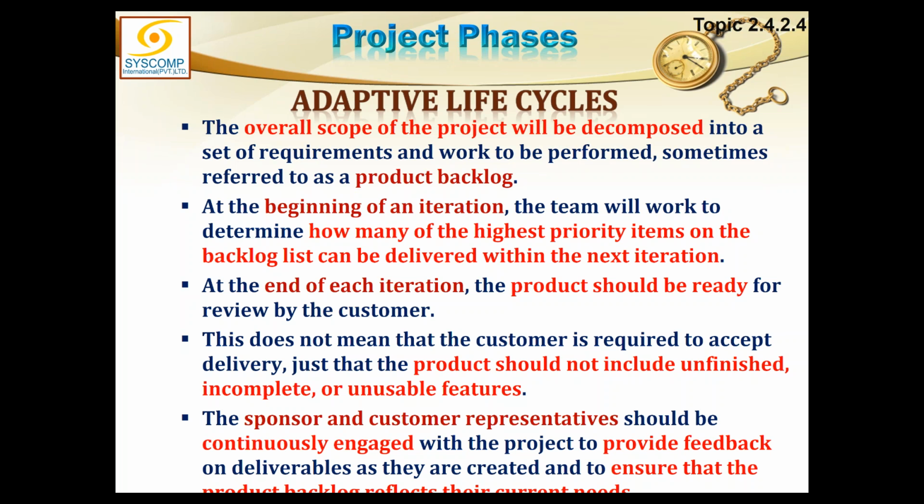These people have been brought in front of the product backlog and have been given liberty to pick as many highest priority items as they can for their iteration, maybe of 2 weeks. Now they have chosen themselves. Nobody has imposed this work on them, and they take the sole responsibility of completing it.